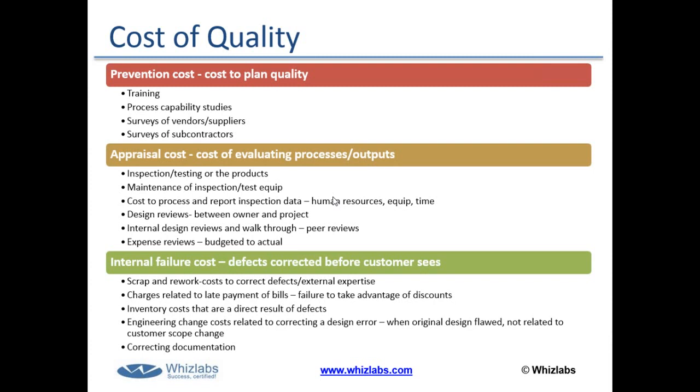But after preparation of the basic documents in planning, is there any sign-off like project manager with customer and stakeholders? I have not seen that in the PM book. We're talking about sign-off during the planning stage? Yes. In the planning stage, you get the sign-off from the customer on the project management plan.